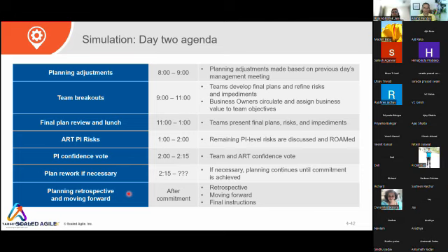Hi, Abhishek. I have a question here. Am I audible? Yeah. So, in my current project, we had a 3-day PI planning this week, starting from Monday till Wednesday. Do you think that's an anti-pattern? No, it's not an anti-pattern, because sometimes you have distributed teams. Some teams in the US time zone, some teams in the UK time zone. So maybe you can plan for 4 hours a day or 6 hours a day. You cannot plan for 8 hours a day.